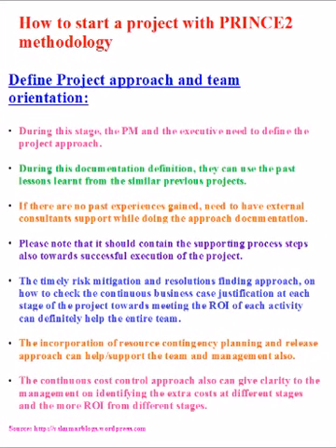So the project manager's responsibility is to control the project budget, and at the same time to monitor the resource costing also. If it is increasing above the parameter, it needs to be controlled upfront itself, and they should keep some kind of buffer to manage the project for sudden risks or unexpected expenses that are going to be incurred due to unavoidable risks that were identified or occurred. In such cases, the return on investment for each activity also needs to be measured. Those guidelines should be defined in the approach document.